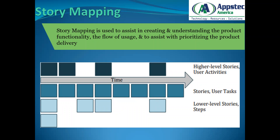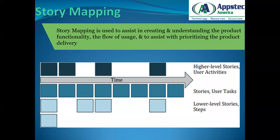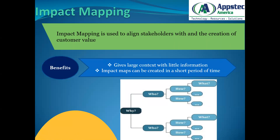From that discussion and mapping, you are outlining the major problem statements your application is going to solve. It's also easy to respond to certain changes that might come over the development life cycle, because when you add a new user story or remove an existing feature, it's easy to spot what else needs to be done to optimize your product. Story mapping helps you understand the flow of your features, divide them into high-level and low-level tasks, put a timeline against them, and prioritize product development.